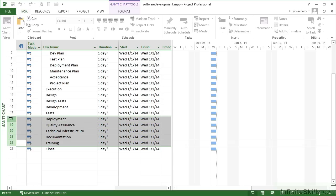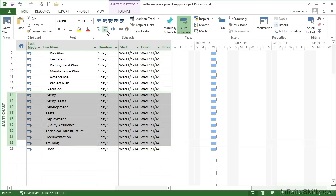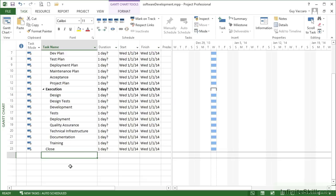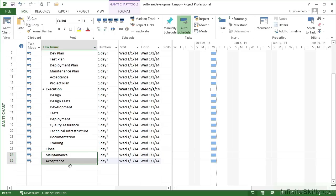All of those are going to be the subsections for the execution phase. So highlight fourteen to twenty-two, little right arrow, indents all of those to be subsections for the execution phase. Then we have the last phase, the closing phase, and I can add its two sections below there: maintenance and acceptance, and then simply indent both of those to be part of that phase.